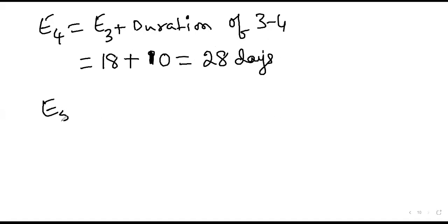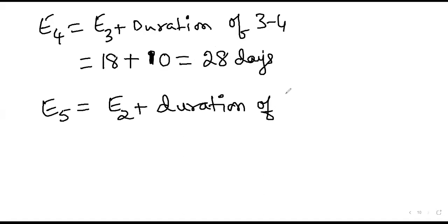Okay, E5. Can anyone tell the equation for E5? E2 plus the duration of 2 to 5.